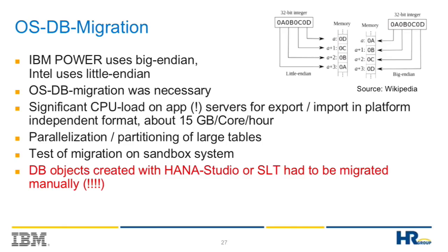So we got the information that the tables that were really necessary for the customer were not there, because he wants reports on the point of sales data. We only exported the data that was in the dictionary of the database, but not what was created with the HANA Studio.